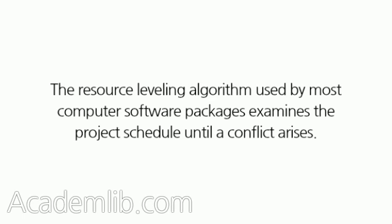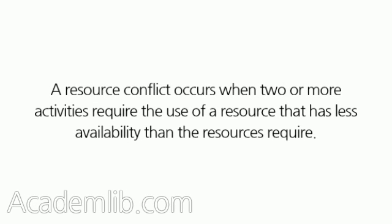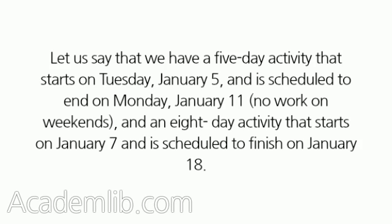The resource leveling algorithm used by most computer software packages examines the project schedule until a conflict arises. A resource conflict occurs when two or more activities require the use of a resource that has less availability than the resources require.